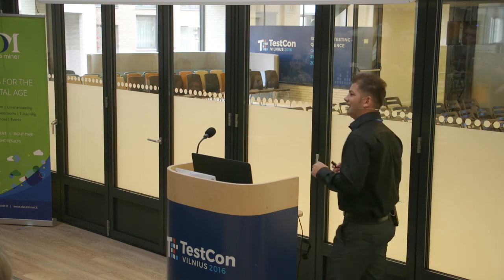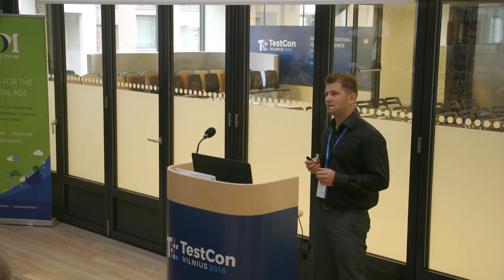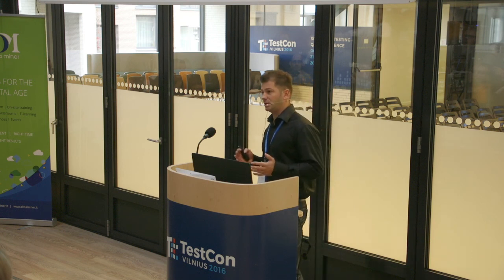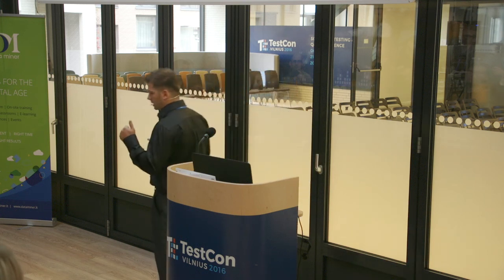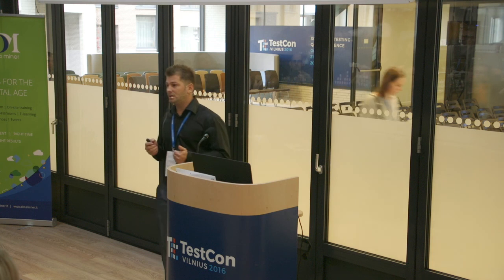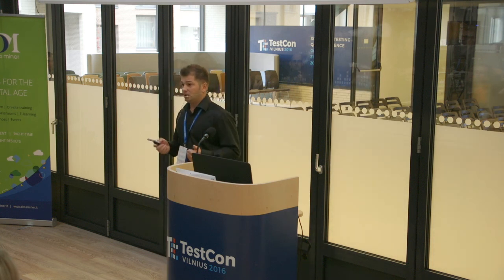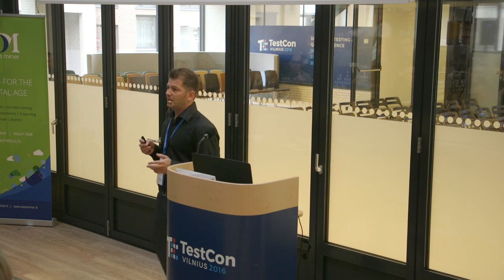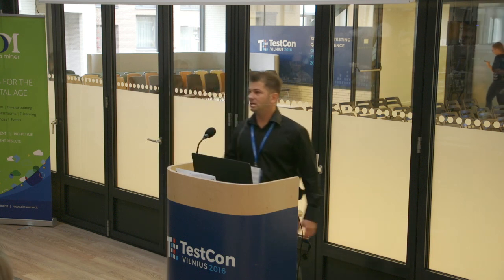Yes? No? Okay. Well, bus factor means the minimum number of team members that have to suddenly disappear from the project before the project collapses due to lack of expertise and competent personnel. So imagine that we have a company where only one person knows a specific area of the code. Then we have a bus factor of 1. In case something happens suddenly with that person, I don't know, surgery, or is hit by a bus, that's why it's bus factor, or he's just quitting the job, just like that, then your project is vulnerable, and you don't have a sudden replacement, so you are in big trouble.